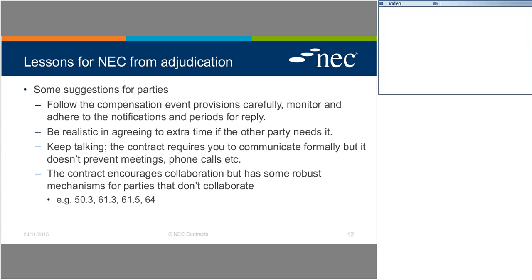Now, in our preparation for this webinar, we did discuss the use of online contract management systems. There are various ones out there. We don't want to appear to favour one or the other. But when you use those systems, they will track compensation events. They will tell you you've got 2 weeks left to do this or 3 days to do that. On larger projects with a large volume of correspondence, it becomes increasingly difficult to adhere to the contract if you're just relying on an Excel spreadsheet or an Access database.